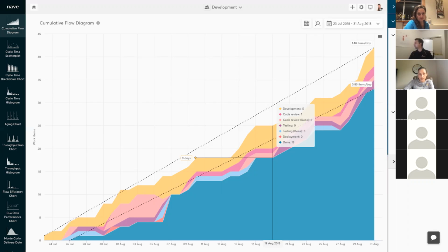To maintain a stable system, strive to keep your WIP as consistent as possible. If WIP is consistent, arrival rate and departure rate lines will grow in sync and the distance between them will stay equal. It is important to say, though, that the data displayed on a CFD depicts only what has happened for a given process, and it shouldn't be used for any type of future predictions.